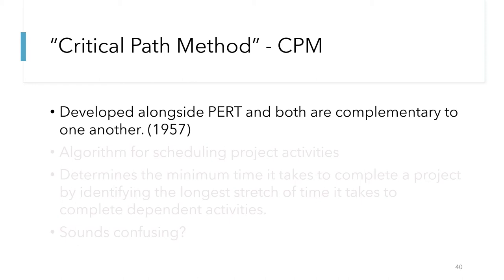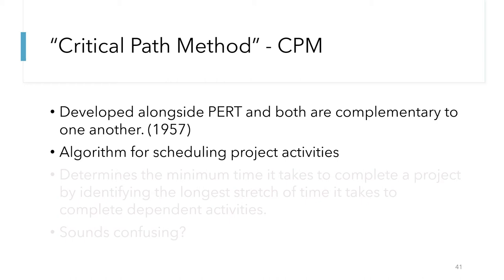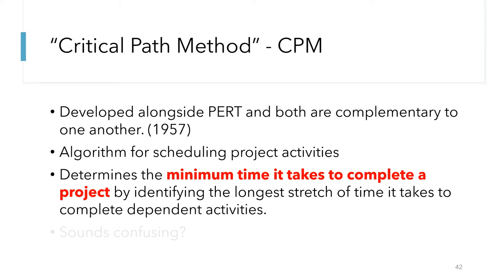Alongside the development of PERT was the Critical Path Method, or CPM. Because these two were developed alongside one another, it can be said that CPM and PERT are complementary to one another. CPM is an algorithm for scheduling project activities. The goal of CPM is to determine the minimum amount of time it takes to complete a project by identifying the longest stretch of time it takes to complete a chain of dependent activities.